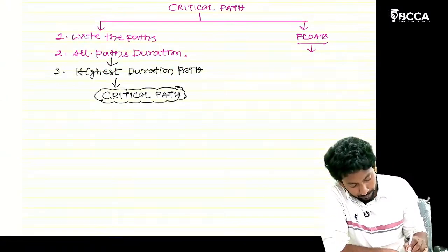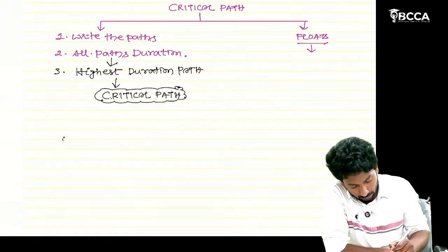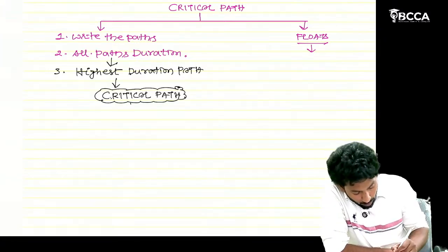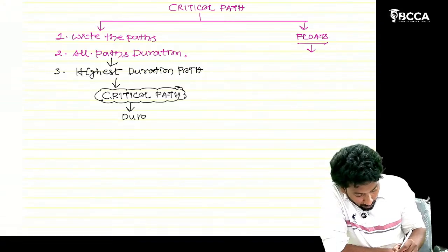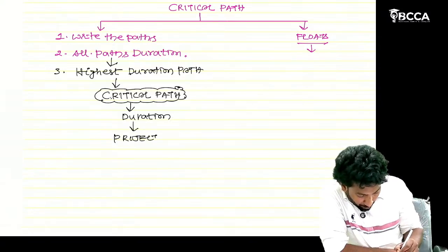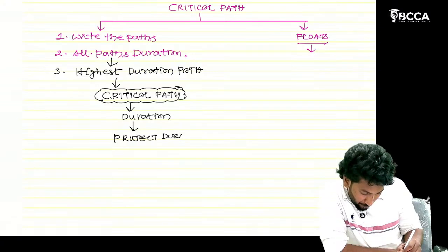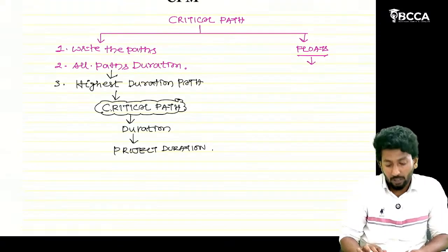Now, critical path duration is nothing but project duration, sir. Critical path duration is only the project duration.